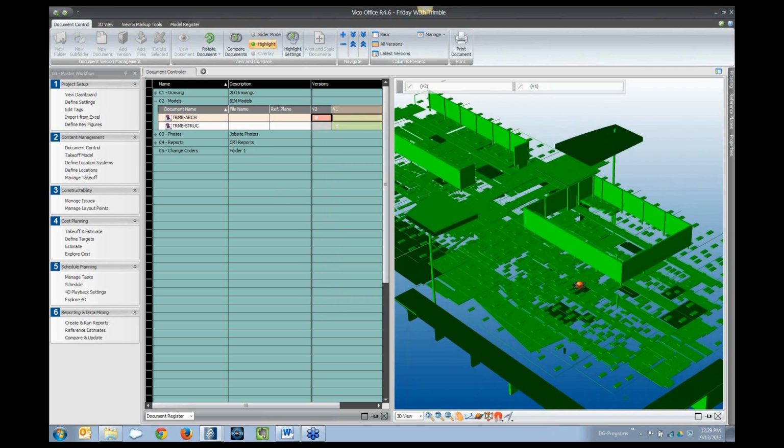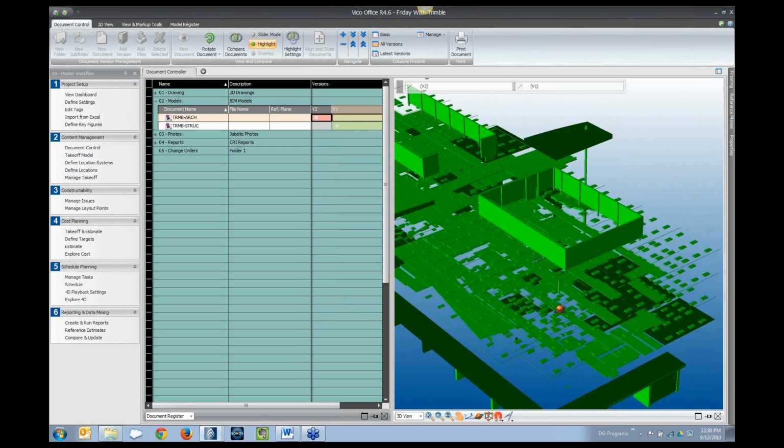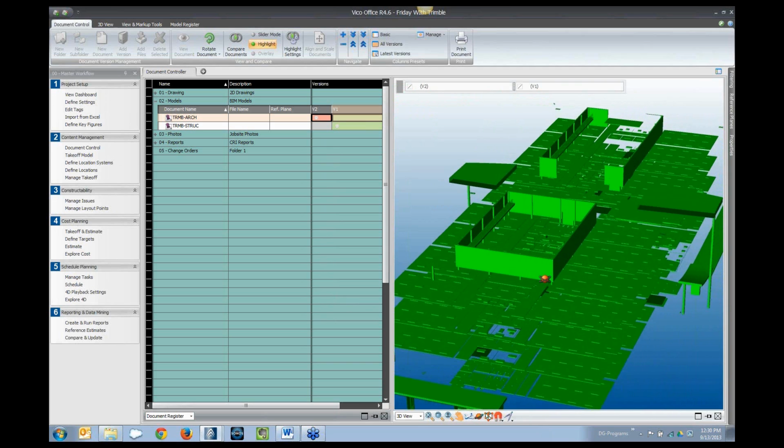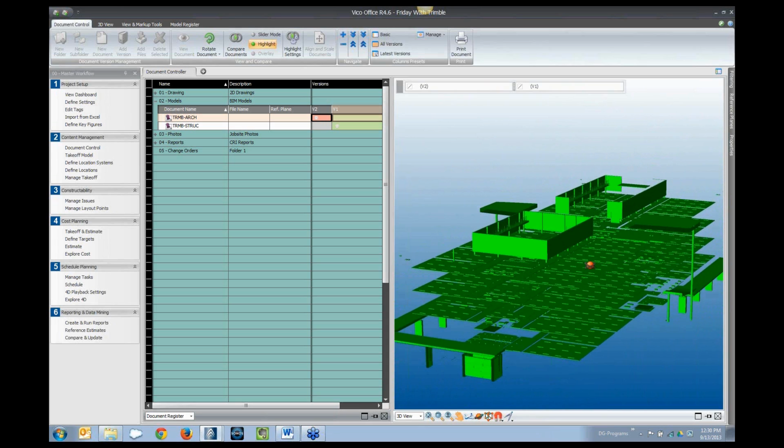So if I need to communicate to the rest of my team, say my cost planners and my cost schedulers, about which part of the project I need updated, right away, as soon as I get the new design release, I don't have to spend a ton of time trying to figure out what has changed between the two. I can just look and see that everything displayed in green right now has been newly added in the last 2 weeks since I got the model update. So I'm going to want someone working on the facade estimate, and clearly there's been some interior work to finish the reflected ceilings and the layout of all the MEP fixtures that are going to go in there. So now I know right away what I want to tell my estimators to start working on so that the estimate can be updated with the model straight away.